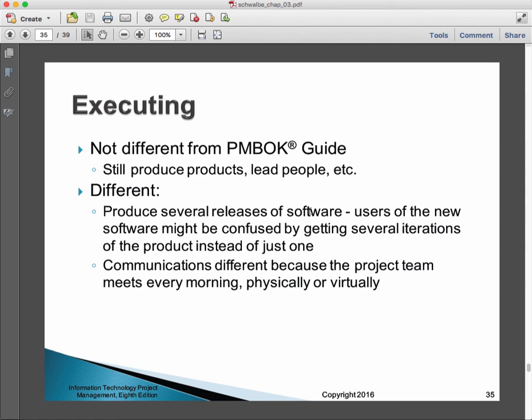So this is the truth, although I tend to characterize it slightly differently. There are plenty of traditional waterfall projects that we break up into phased implementations. We might take all the functionality of the solution that we're trying to build, say it's comprised of 3 subsystems, and deliver them 1, 2, and 3 in 6 month increments.